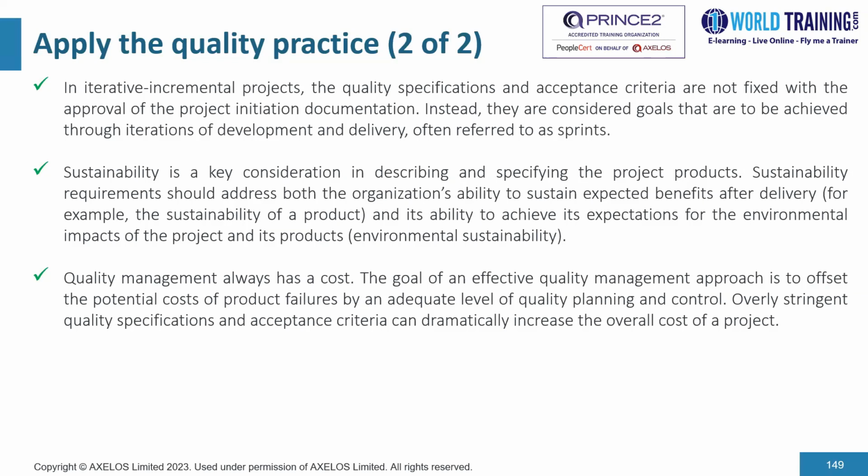Now, quality management always has a cost. The goal of an effective quality management approach is to offset the potential costs of product failures by an adequate level of quality planning and control. Overly stringent quality specifications and acceptance criteria can dramatically increase the overall cost of a project.